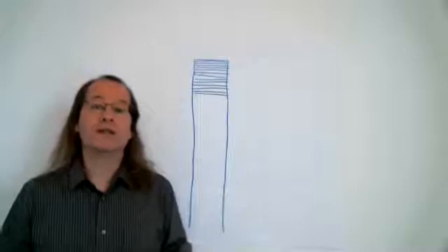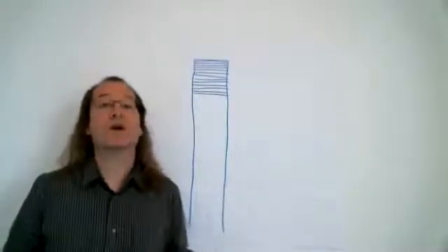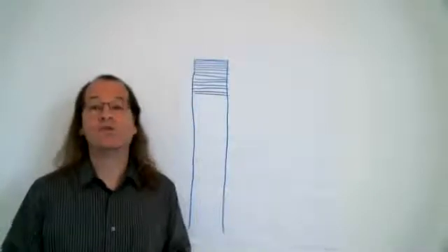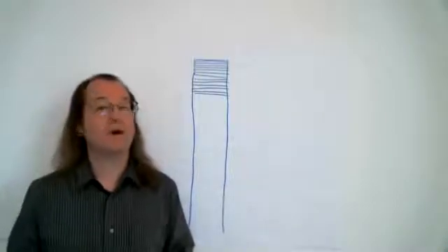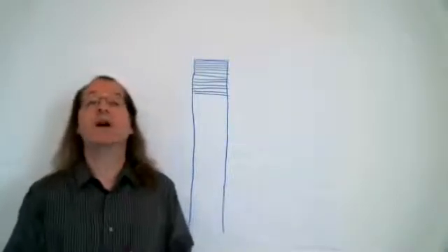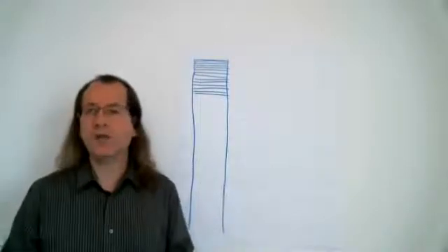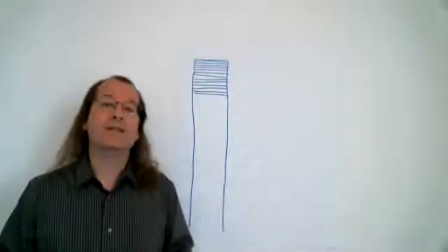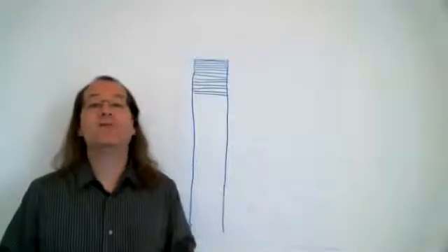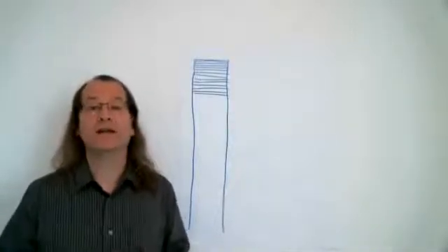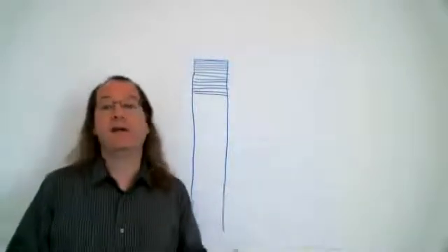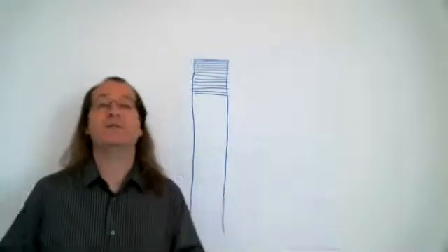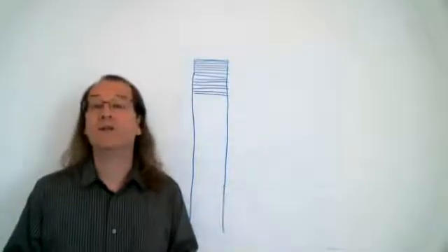Sprint ready also means that the development team, the product owner, and the stakeholders all have very high confidence that they have a shared mutual understanding of what the outcome from that product backlog item will be, right? When the team is done creating that thing, we all really believe that we're on the same page about what we're going to get. Also, the development team doesn't know of anything that would prevent them from finishing that item, right, all the way to done, in a single sprint. So for example, maybe a dependency. I might have a small, well-defined item, but we can't get it all the way done until some other team does some piece of work. Well, that item might not be sprint ready then.